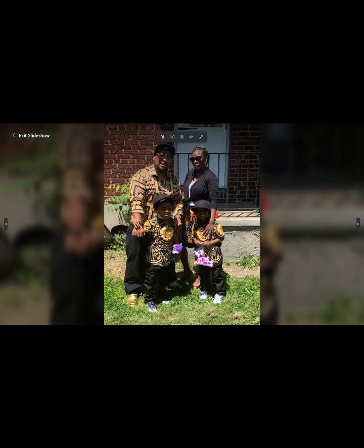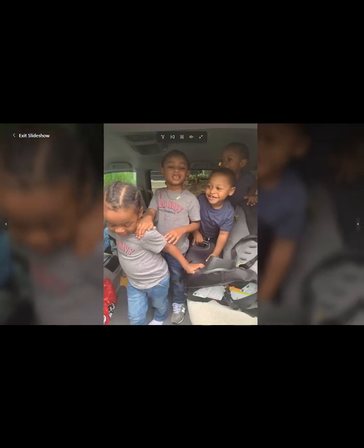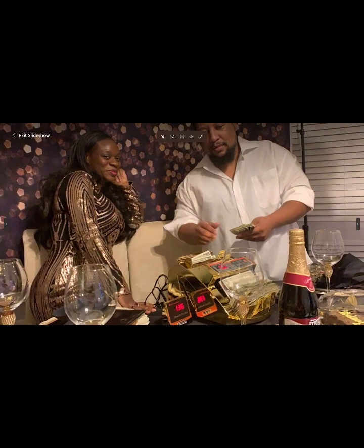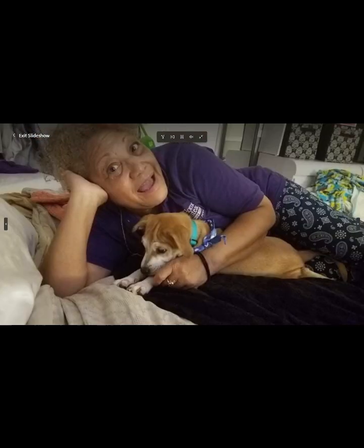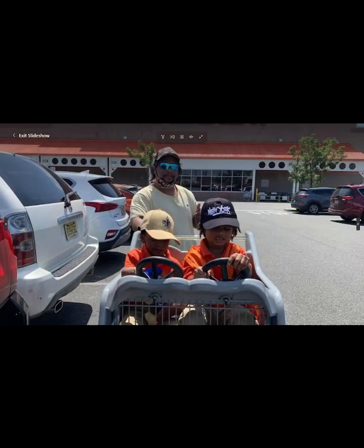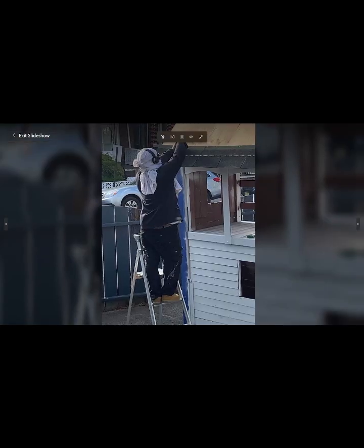Impossibility of performance. In a situation where the action that was contracted can't be performed legally, the possibility of performing the task can be declared impossible. For example, suppose you hire a builder to build an addition onto your house, and after you sign the contract, you find out the town won't let you build the addition. At that point, you are no longer obligated under the contract because the performance is legally impossible.